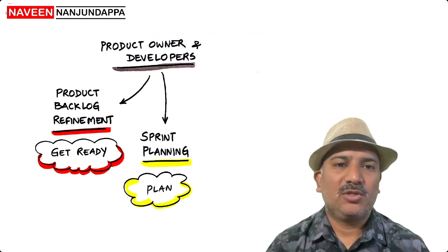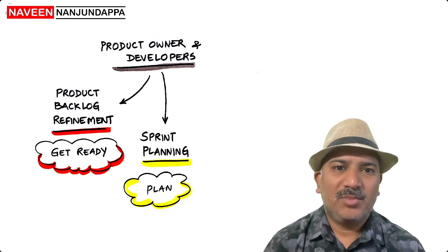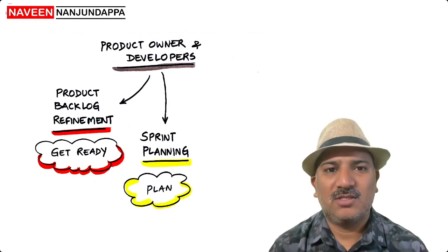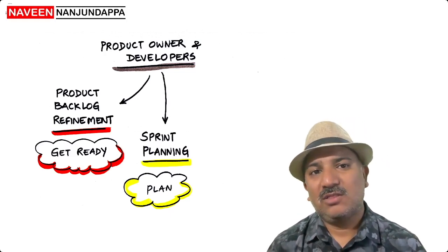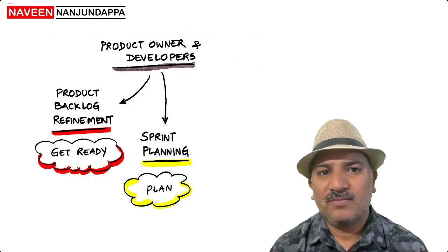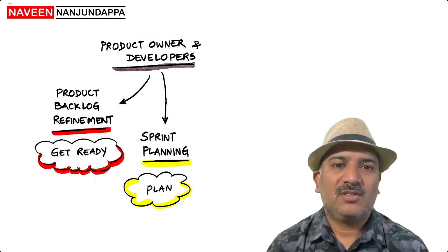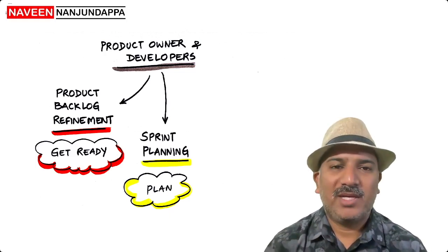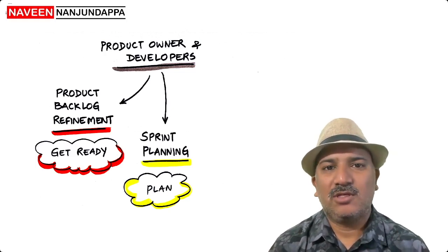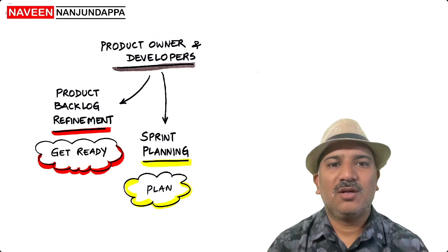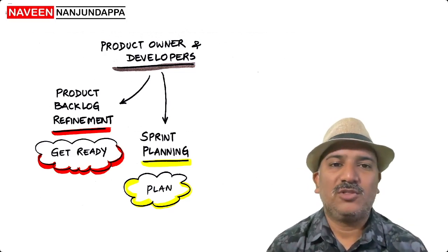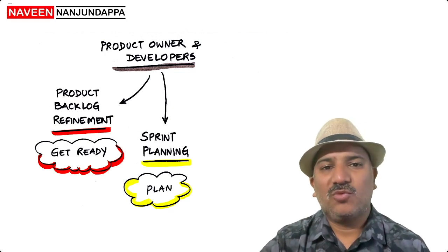Let's say the sprint goal is implementation of offers. The team members, the developers, look at the functionalities that add value towards implementing offers. Each one of these functionalities or each one of these product backlog items is small enough to be completed within a day or so. Based on the objectives, the team pulls out the product backlog items and makes their plan just sufficient to get started. And the plan itself can be inspected and adapted during the sprint. Once the team is clear about what the objective is and the product backlog items that they potentially foresee to be focused on, the team continues to work.